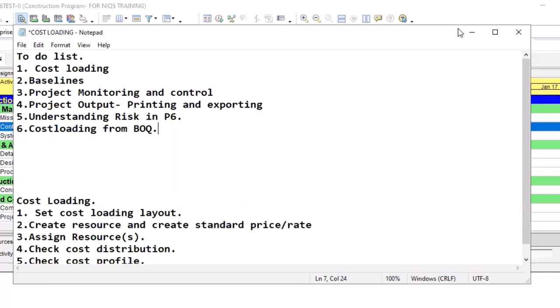It's a new revision, right? So you have to re-baseline the schedule, or you save it as another baseline. But you need to keep the history. So Primavera is very robust. It has helped you to do all of that. And how do you do so? Before you start progressing your schedule, you must baseline your schedule. That means you're taking a snapshot of what you have planned and you save it, so that when you start your monitoring and control, you have your basis for comparison. What did I plan and what am I earning? What did I plan and what is the actual? What is my planned cost? What is my actual cost, right? So that is how you look at that.